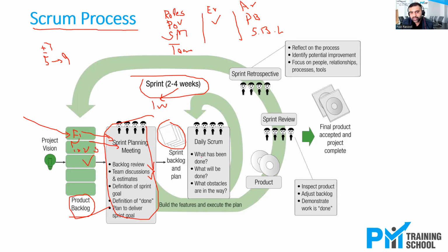Okay. Now, for this sprint or iteration, both are the same things. We start doing our work. We start completing that work. We work in a self-organized manner. Self-organized manner means we don't have any project managers or anyone who is commanding and controlling us. There could be team leaders. There could be scrum masters, who are helping us, who are working as servant leaders, but we as a self-organizing team choose the work, we size it, we estimate it, we plan for it, we do it. And for the purpose of coordination, we do daily scrum.